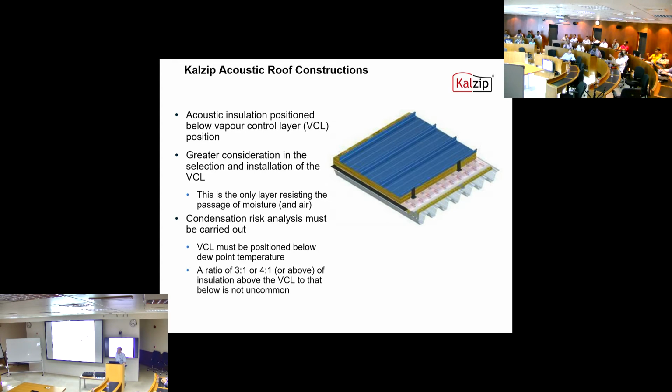How long can it be exposed to the sun before we put the rock wool and insulation on? As soon as possible. You don't want to leave it out for too long. So like one week? You're probably looking at a bit longer than that, maybe a month at the longest.